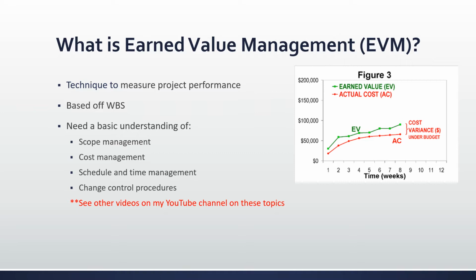But to go over them here briefly, scope management. The building blocks of EVM are found in your approach to scope management, your scope items. You'll get these from your work breakdown structure for the project. So it's essential that you have a detailed and accurate scope because delivering this is how you track progress and ultimately value. Cost management. The next important element is cost management.